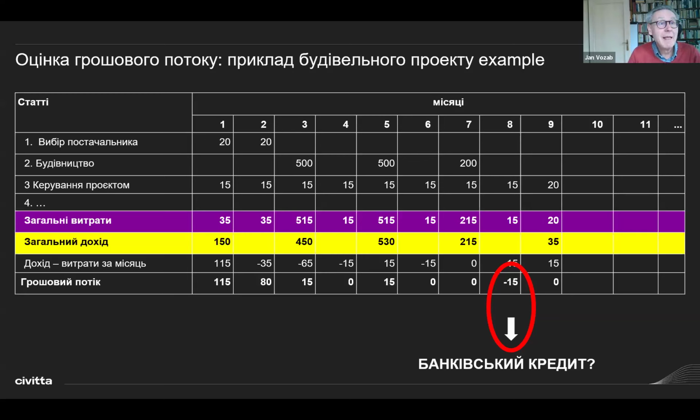But really, his experience over about 8 or 10 months, when he wasn't sure when he will get the money from the European Social Fund, was very, very frustrating. So you should calculate the cash flow using the real periods when the donor is expected to give you the money, not according to the promises written somewhere, but according to the real experience. That's important.